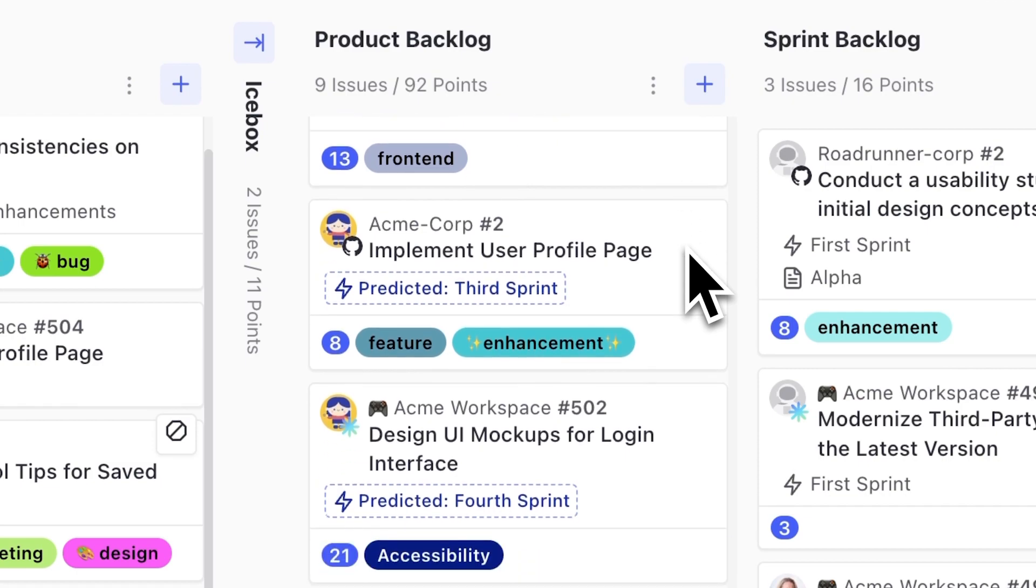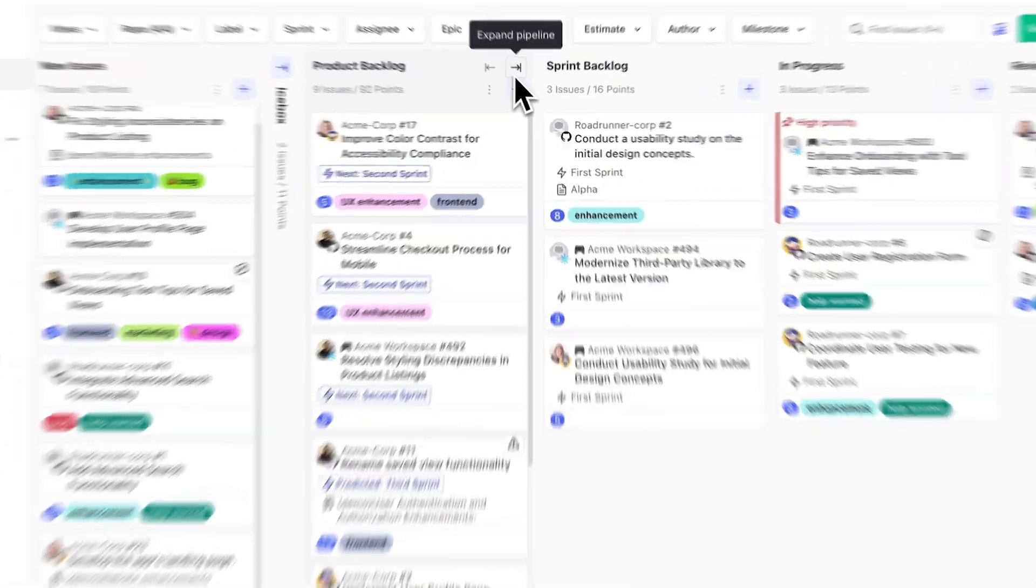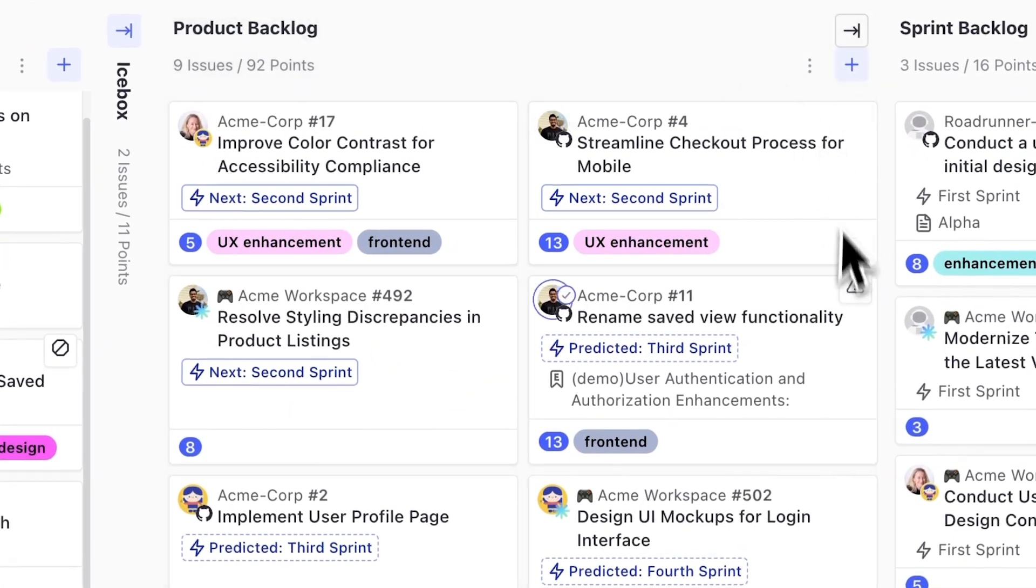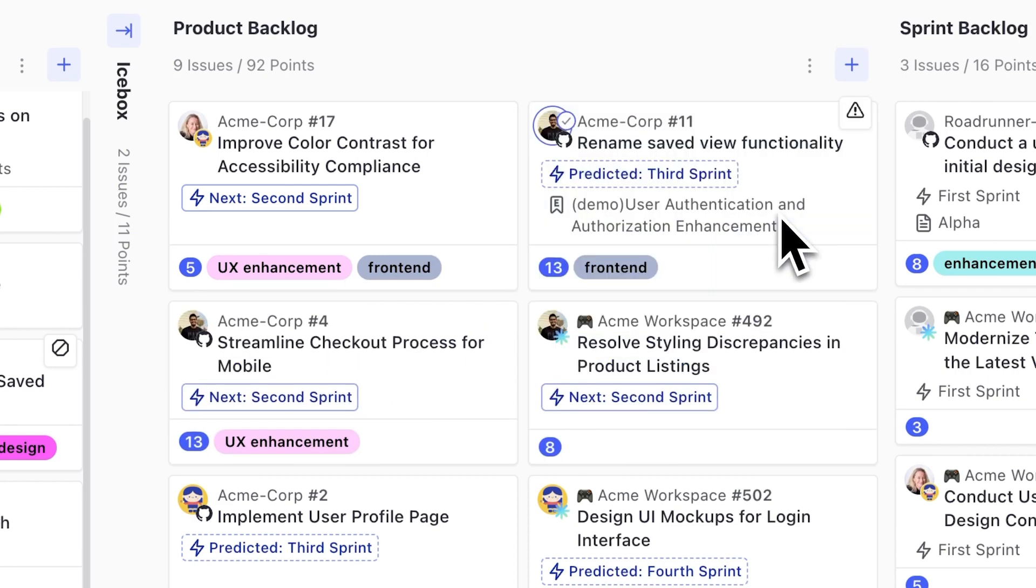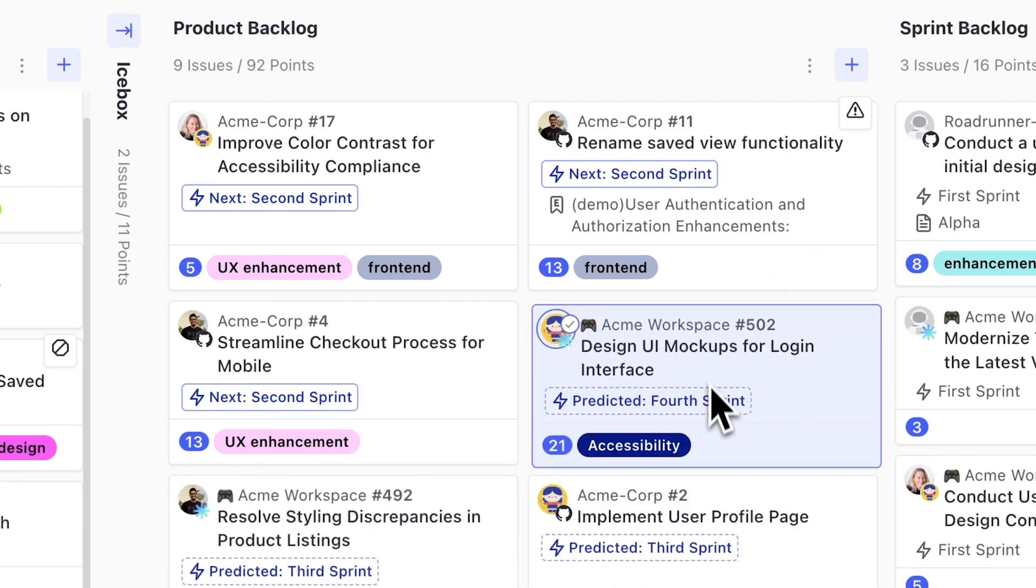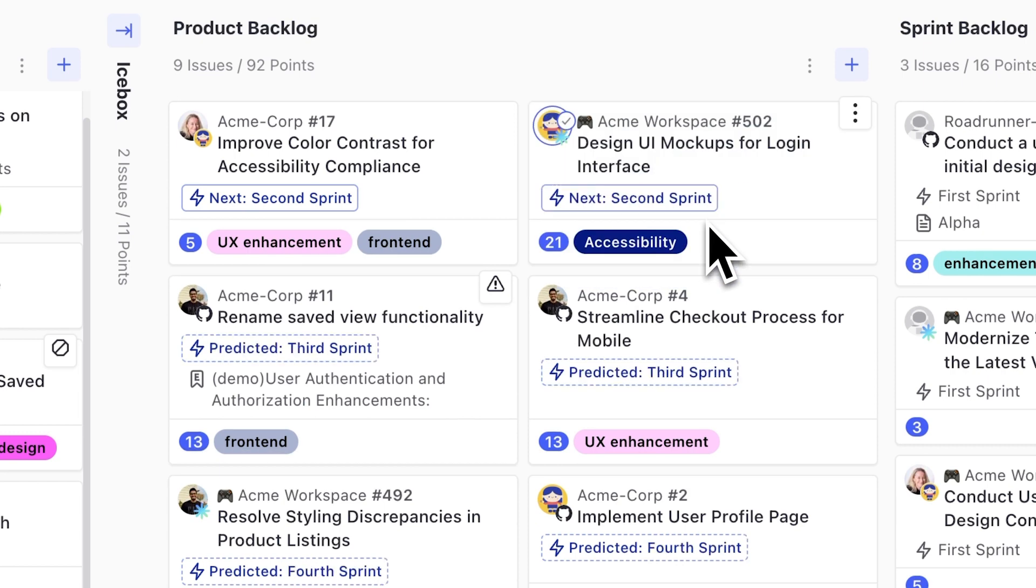Need to tweak a bit? Go into our backlog refinement mode by flipping multi-column pipelines on and expanding the pipeline. Now, just drag and drop the cards into the order you need. You'll instantly see your predicted sprints update. It's like word wrap for sprint planning. Nobody else does this.